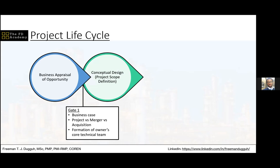In the concept selection phase, you validate the business case that was proposed in the beginning, and then you come up with a scope of work, because you have already run some simulations. You have come up with a basic scheme on which the facility is going to operate. Based on that basic scheme, you can come up with a scope of work for the front-end engineering design, that's the basic engineering, and then maybe even some scope of work for the EPC